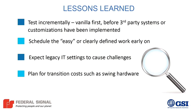Yeah, and so the operation team was helping out on this last one. We had a 9.1 environment. It was a POC environment in our main data center. So we had our 9.1 environment already up there. So what do we do with this environment? Can we reuse it? Where do we swing that cost? And so we used it a little bit. And then we actually had a tool inside of Oracle Cloud. And we could actually bring a few of those servers of the 9.1 environment into the Oracle Public Cloud, and basically that helped us out with the timing of that.